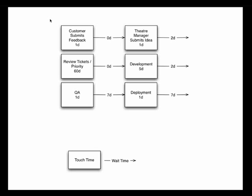Value stream mapping is a technique for identifying how your ideas go through and get built and developed and eventually end up in your customers' hands. A box represents touch time — there's real operational value being added to a piece of work, a feature — and an arrow represents wait time, a feature sitting on a shelf waiting for someone to get to it.